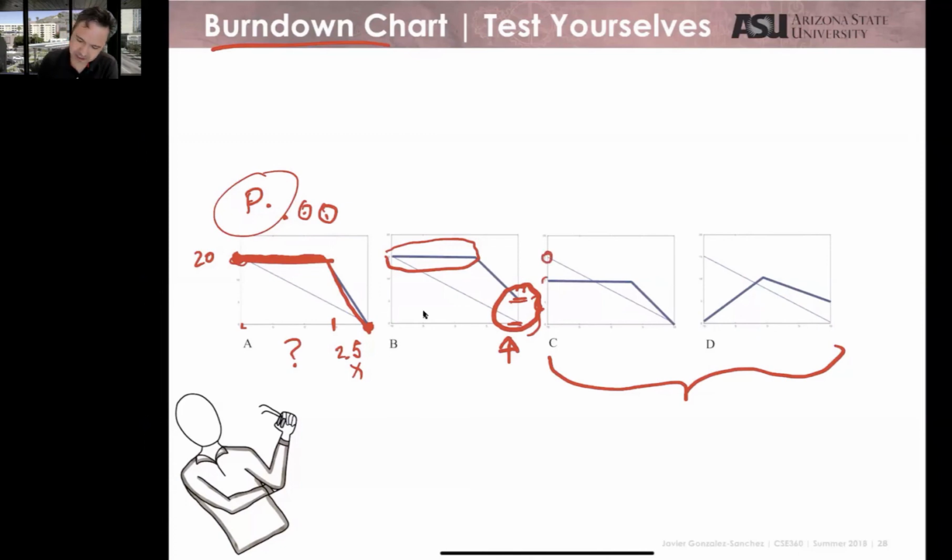These 2 points, be careful. I mean, this is supposed to be day 0. This is supposed to represent how many things you put in your sprint backlog. So it's kind of weird that those 2 lines do not start in the same point. What could be the reason for drawing this here if you really have this in day 0? Something is not correct.